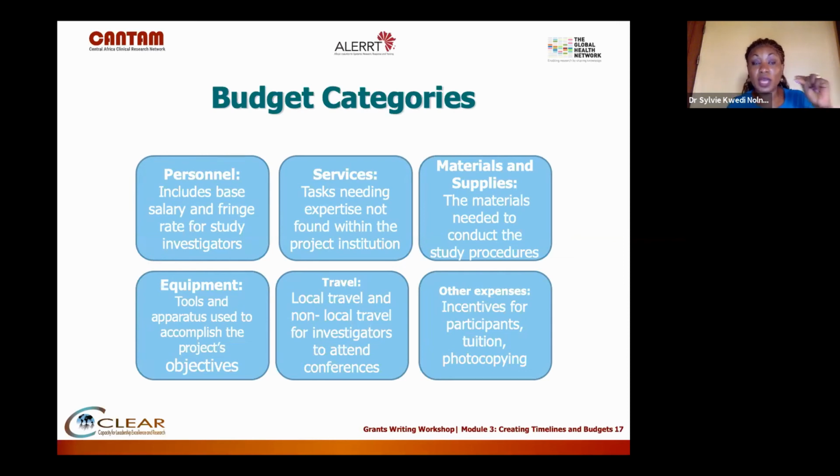You need the expertise for that post available for 40 hours a week, which is a full-time week. That does not particularly mean that you need one person for those 40 hours, 100%. You might need 2 people, 50% and 50%, if you need a full-time equivalent.